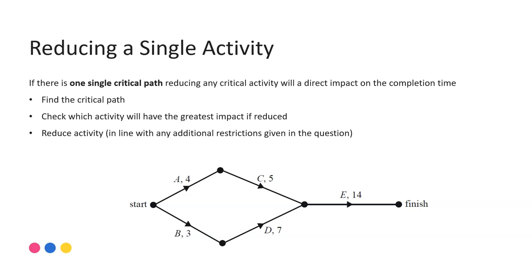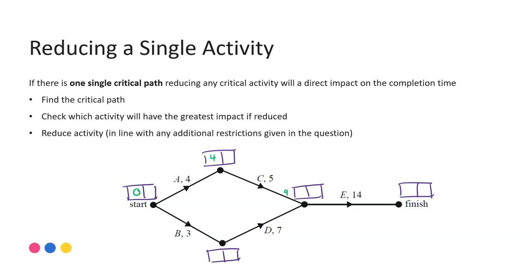From a general sense, if we look at this network and complete a forward and backward scan — remembering our setup is to put double boxes on each of our vertices to track our earlier start times and later start times — starting at zero, travelling along activity A takes four, plus activity C is five. We have to consider both C and D coming into that point. Going back to zero, plus the duration of B (three), plus the duration of D (seven), gives me 10 at this point. E can't commence until both C and D are completed, so we start E at 10. Then 10 plus 14 gives 24 as our completion time.